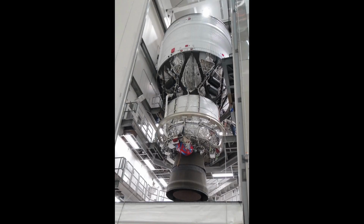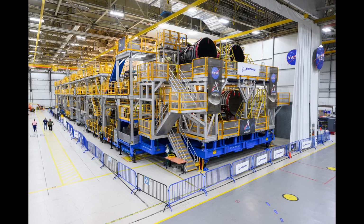I've gone over the SLS boosters, but overall the rest of the launch vehicle is waiting for transportation to the launch site and handover to EGS. ICPS-2 is said to still be waiting in storage in United Launch Alliance's Delta Operations Center at Cape Canaveral. It can't be stacked until after the core stage is mated to the boosters, which was last said to be sometime in the fall. If that's another way of saying by the end of the fall, then somewhere around that time, ICPS would be moved to the multi-payload processing facility to have its attitude control system hydrazine tanks loaded for flight.